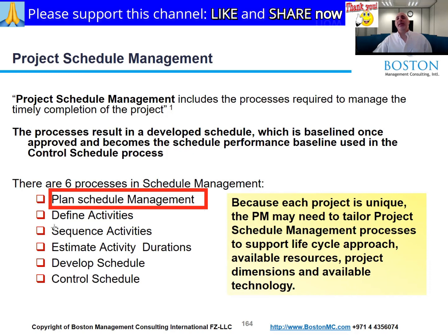But beyond this, this is where we will identify the activities. When you identify them, you use decomposition from the WBS. You just break down the WBS into its activities. And don't be worried, you don't have to be technical because you're not the one who has to do it. You ask the team lead who you've assigned that WBS task to go and figure out the activities with their own teams. They know what they're doing. It's their specialty. It's not yours. Your specialty has to be project management.